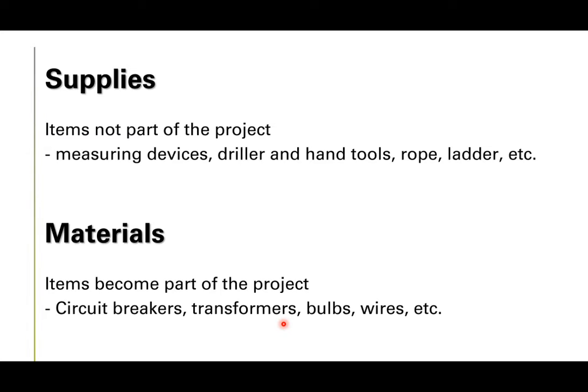First, supplies are items that are not part of the project, such as measuring devices, drills and hand tools, rope, ladder, etc. While materials are items that become part of the project, such as circuit breakers, transformers, bulbs, wires, etc.